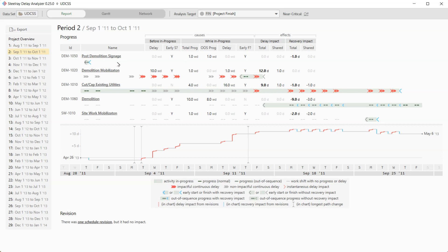So for instance, looking at post-demolition signage, we can see that there was an early, that it started early, that it had one day, one working day. That's what WD is, of progress. It did start out of sequence, as the early start indicated. And it also had an early finish. Those were the causes. The net impact of that was one day of recovery, meaning this activity in this period caused a one day, one calendar day recovery to the finish date.